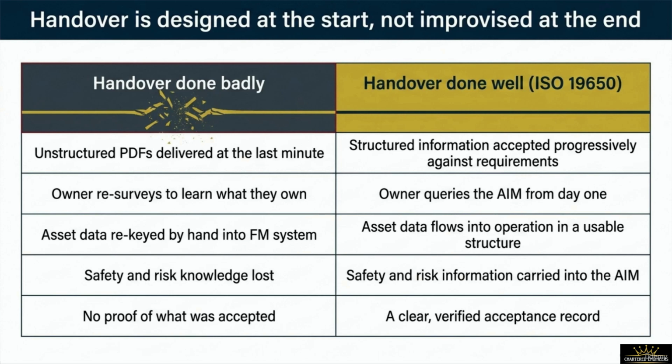When handover is done well under ISO 19650, structured information is accepted progressively against requirements throughout the project. The owner queries the live AIM from day one. Data flows into operations in a usable structure, safety data is preserved, and the owner maintains a verified acceptance record. Let's look at a concrete example using a new hospital facility.